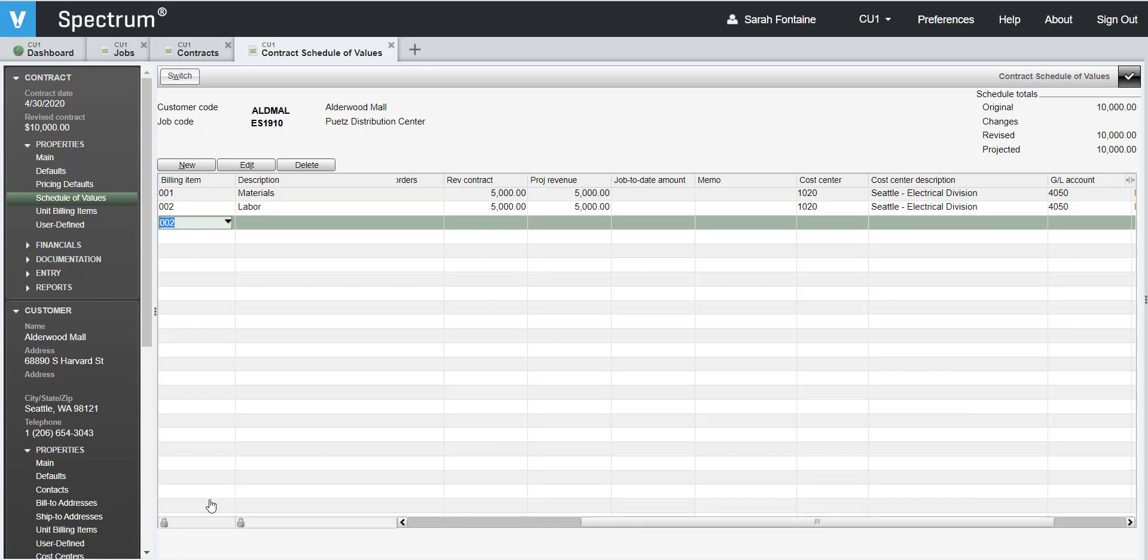Then, verify that the total of your schedule of values at the top right hand side ties to the total amount of your contract before any applicable sales tax. Once you verify that this amount matches, click on the check mark at the top right hand side to save and close out of the schedule of values.